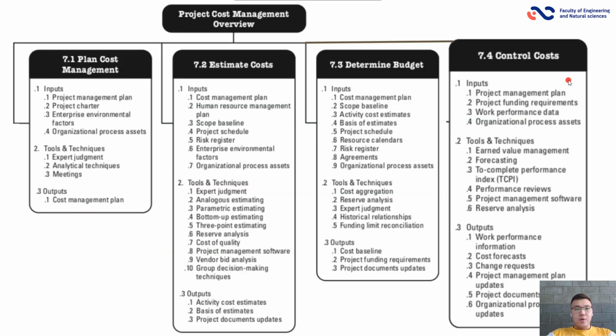Project cost management overview. So here we have plan cost management. In inputs, it's the project management plan, project charter, enterprise environmental factors, and organizational process assets. In tools and techniques, expert judgment, analytical techniques, and meetings. In outputs, it is the cost management plan.